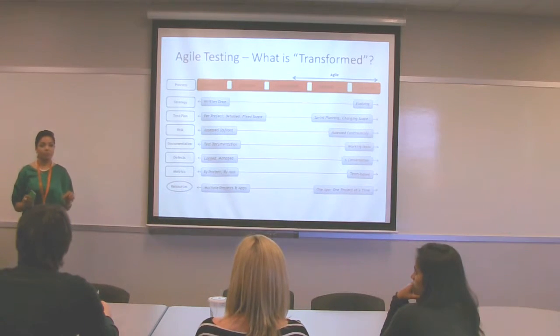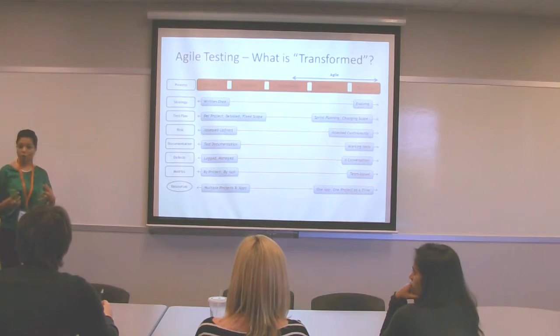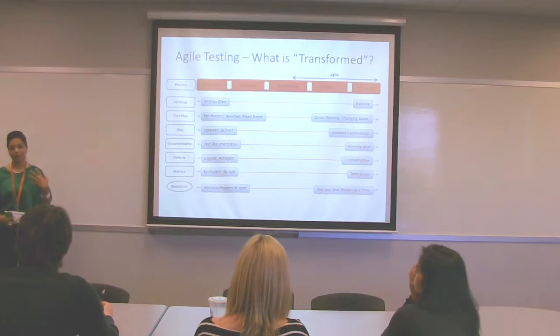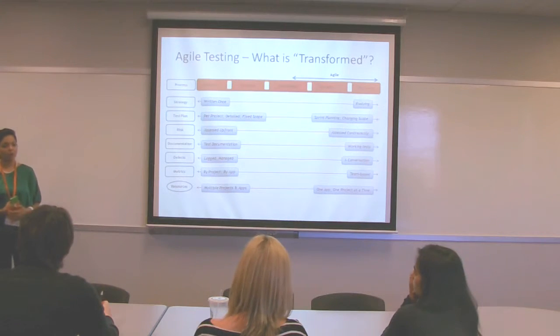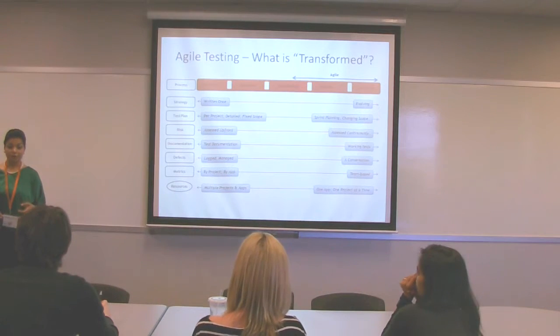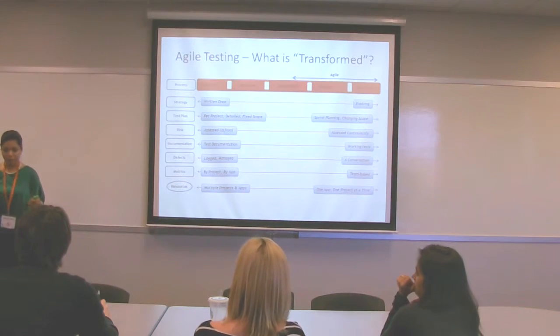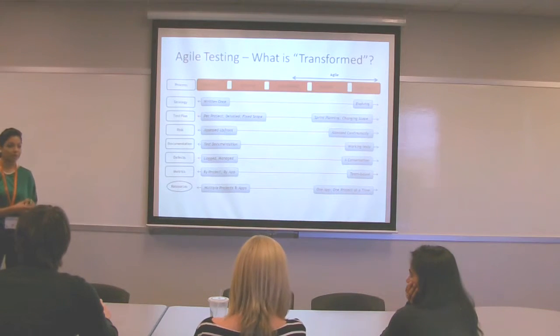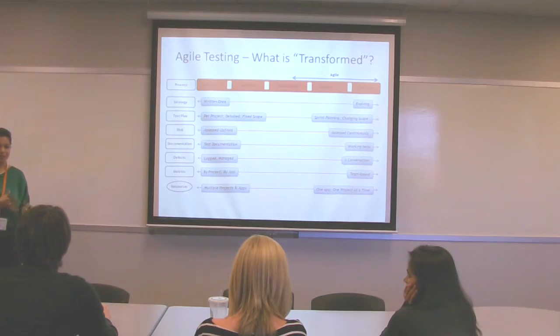I think upper management is still looking for some sort of defect matrix at the end of the day where they want to see what kind of defects were found and how they were logged and managed. Also, I think it is important to log the defects because after a couple iterations, we were able to see where we had most of the defects and what part of the application we had most of the defects. So, we can focus on doing some additional testing in that part.